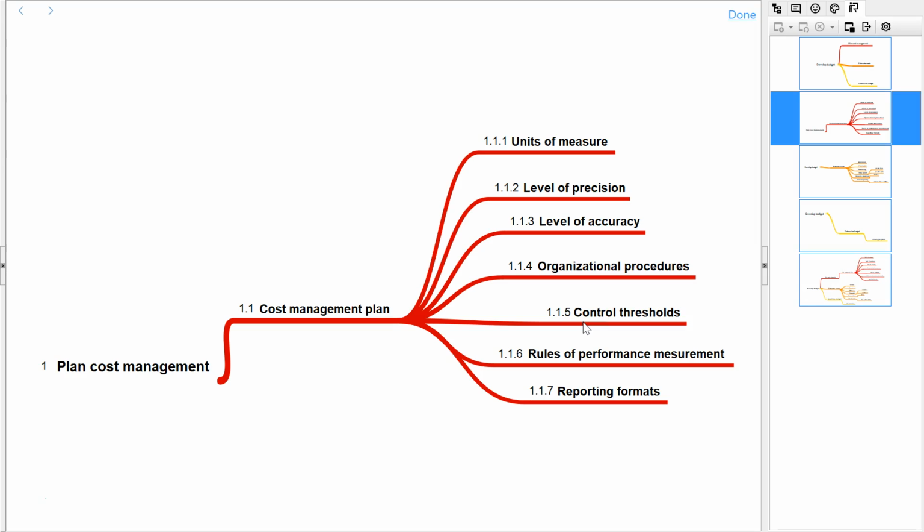The very high risk taker manager can sit on risks without escalating them, and because of that projects can get delayed. So that is not highly recommended. Whereas low risk takers will keep on escalating things very quickly to the next level. So that is also not that desirable.